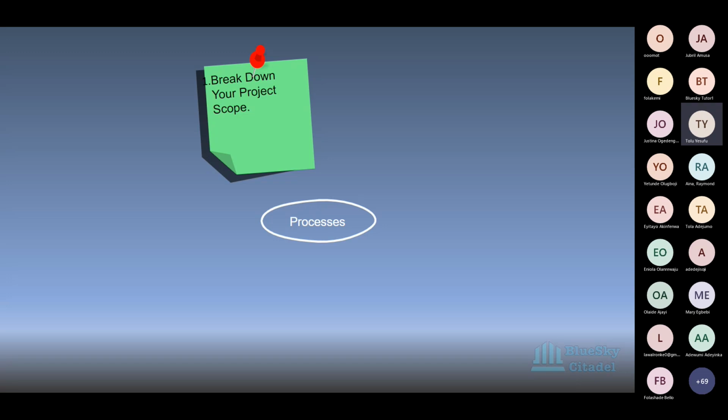You need to understand the vision. You need to understand the scope. When you've been told that something is out of scope, there's really no point adding it into your roadmap. It's a waste of time. It's just going to completely throw your roadmap off. If something is not in scope, why would it be on your roadmap? You will need to know what project activities need to be done before drafting a timeline. You can put a timeline in place, but what's the whole purpose of having that timeline if you don't even understand the activities that need to take place, the tasks that need to be completed?